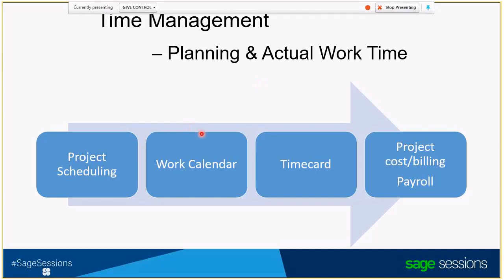Time management, okay. Planning against the actual work time. If the clients use the project scheduling functionality, they can assign the employees to some projects, to some tasks, and the planned hours will display on the work calendar. And you can copy the hours into the timesheet, and the timesheet can be posted to update the project cost and to create an AR invoice for billing purposes.